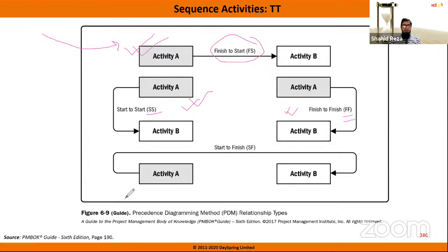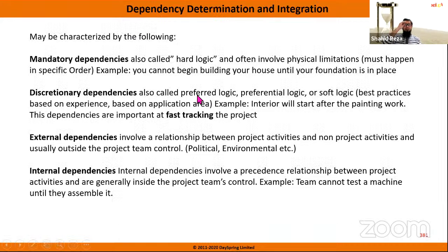All right. And this 4th one is actually rarely used in the project. So sometimes a simple question comes: which relationship type is generally used in the project? So always remember the sequential, the series or finish to start relationship is mostly used in the project. Okay.